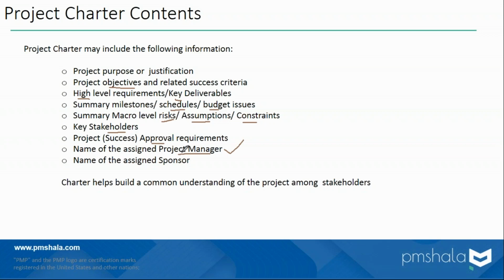How about other team members? Do we mention the names of the team members in the charter? No, it's too early, let me tell you. Forget the names. We do not even know how many people or what type of people we need. We are yet to estimate them. That we will do in the planning stages. So just the project manager is now identified and assigned to the project. The name is also written. And last thing, okay, I said no team, but one exception to this rule.